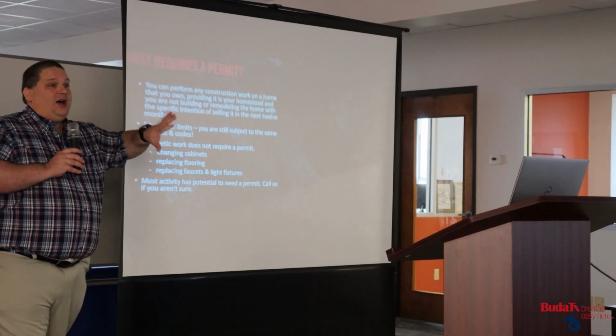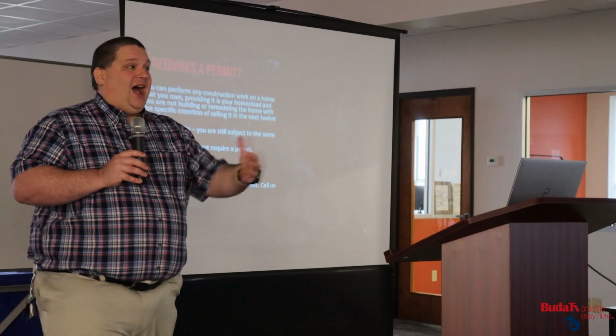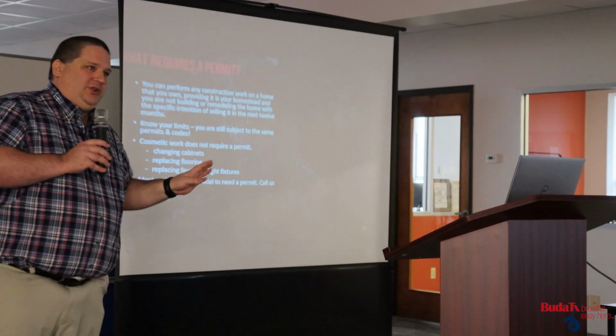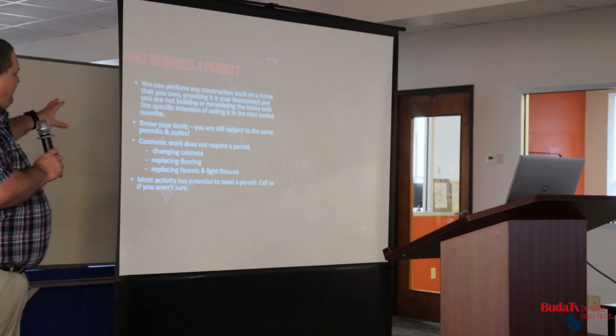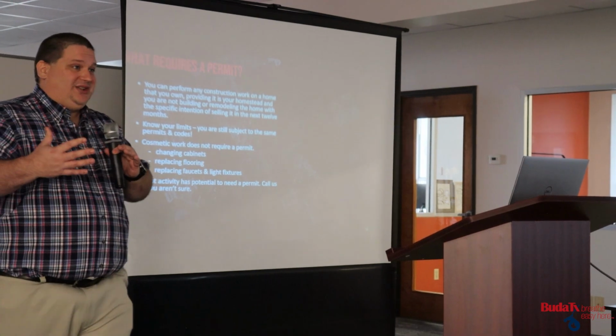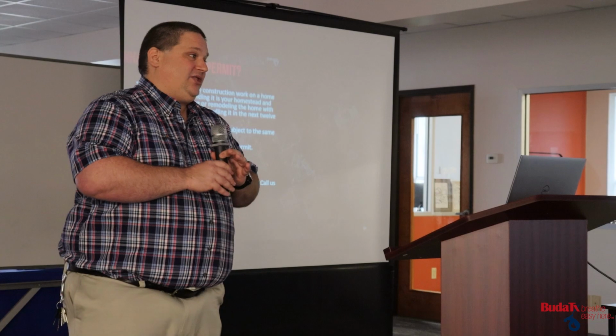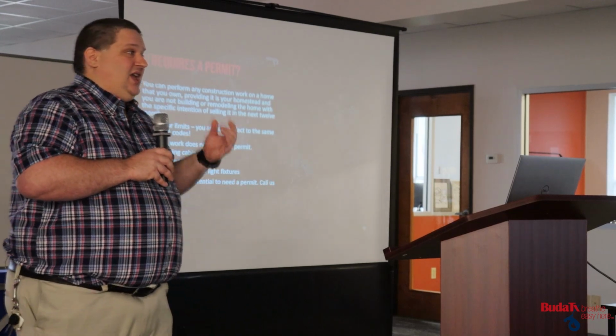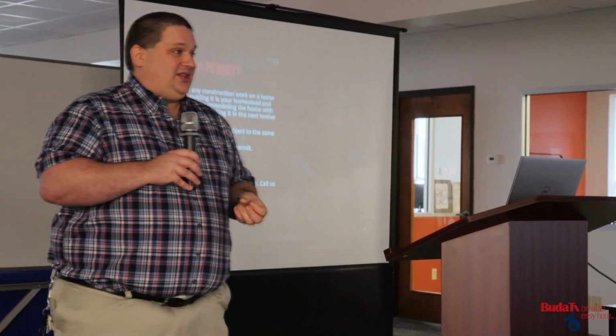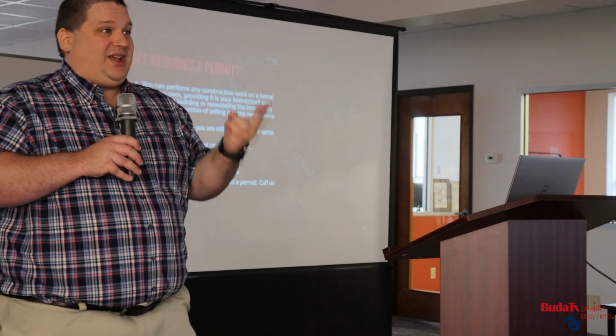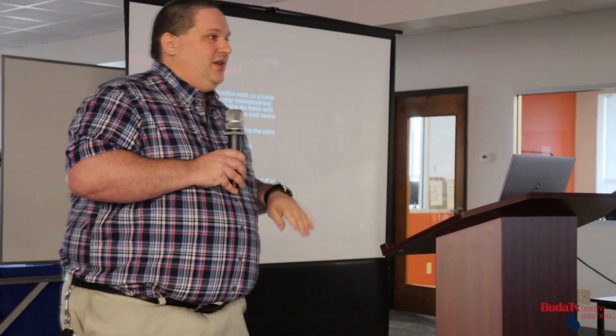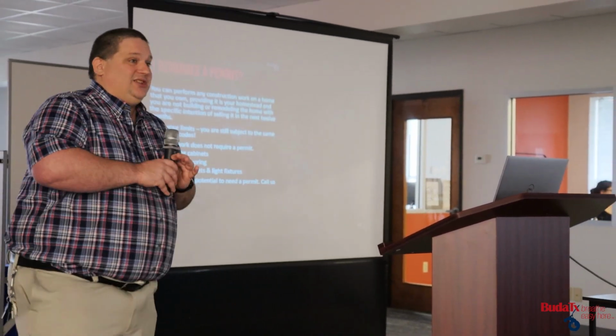So first off, a lot of things we get from people is, hey, I want to do the work myself. And for your home, absolutely the case. For a lot of stuff, you can register as a general contractor for your business because there's no licensing for general contractor. But for commercial work, if it's something that has a trade license, so electrician, mechanical, plumbing, a lot of people are surprised that electricians are a separate license. We do require licensed contractors to do the work.